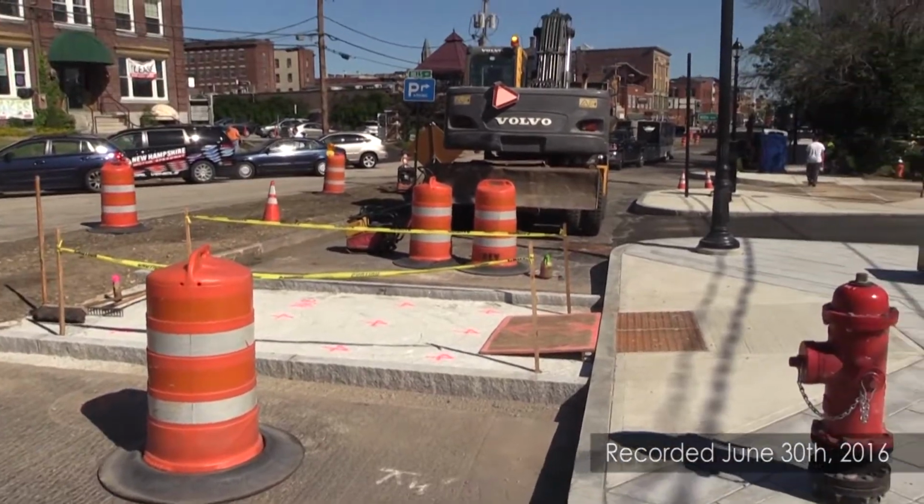Perfect, great. Greg, paving is scheduled to take place here the week of July 11th. What's planned for the east side of the street between the south end of the current work zone, down near the Spank Alley Board Shop and the Capitol Center for the Arts and Store Street? From Concord Street south to slightly north of the Store Street intersection with South Main Street, we will mill and pave the existing pavement that's down there, just take off 1.5 inches and place another 1.5 inch lift and redo all the striping. That'll be the full width of that area. Okay, and that's basically so that the south end of the project area matches smoothly into the one lane here that we've configured the street as in terms of the Main Street project, right?